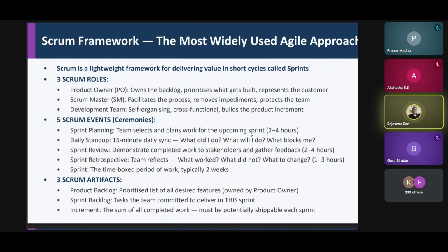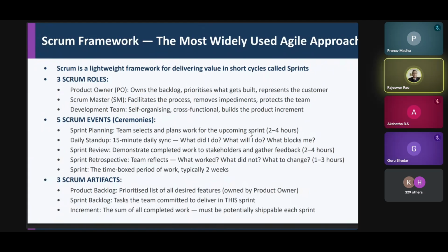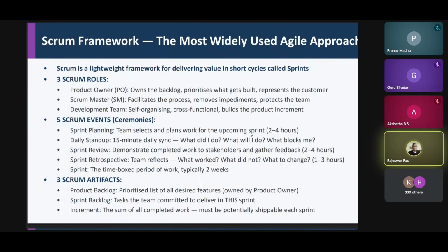The sprint review is a weekly exercise along with the daily stand-up, and this has to happen almost like a religion. Once in 2 weeks, maybe even earlier, it's better to have what is called a sprint retrospective, where the team gets together and assesses themselves. What went wrong? What went right? Can we do things differently? Are there any fundamental shifts happening in the project, internally and externally? And wherever possible, highlight the good job and address some of the challenges within the project.